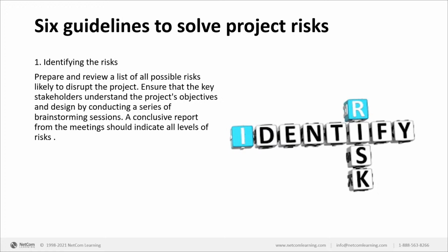Now, if you go through some project management concepts, you will realize that this whole concept of risk identification starts from the very beginning of the project. And when I say very beginning, it actually starts from the point where you're working on the project charter. Because the stakeholders need to know, keep this in mind as well, team, that when I say risk, it's not only for the project manager's eyes. It's for everyone who's involved in the project. Let anyone and everyone know about the risks.